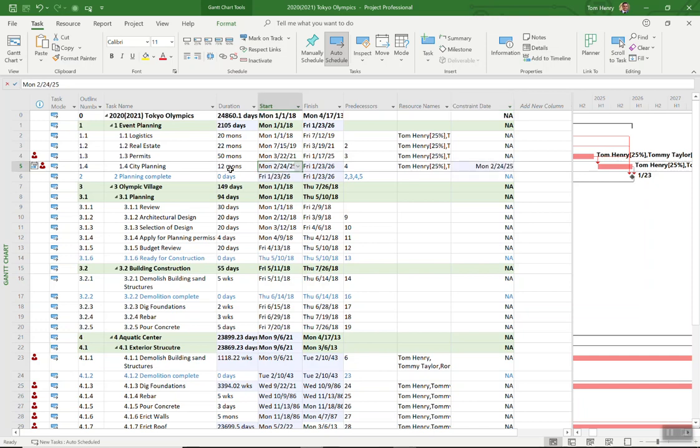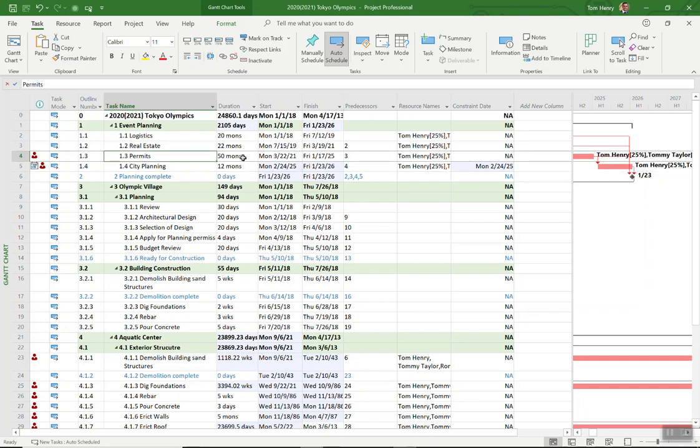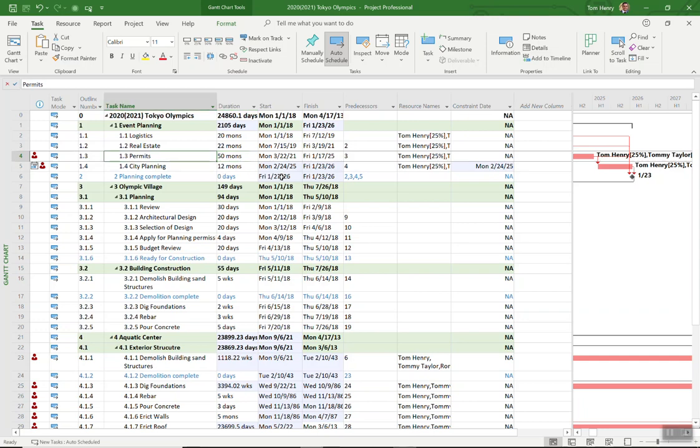If you do want to change a date think why am I changing this date. Well if it's the city planning and it has a predecessor of permits, it's probably because the permits are taking longer. Maybe I could put a lag between the two tasks, maybe I could push out the duration of the permits. Those are other options that you could take. You can learn more about those in the task planning and updating project progress videos that I have.